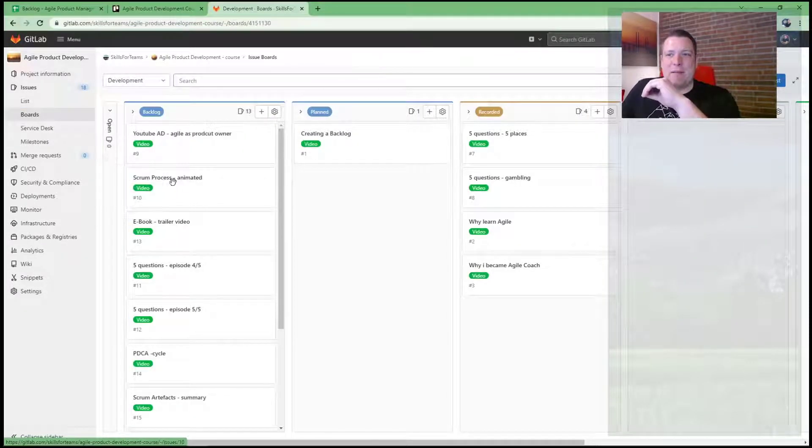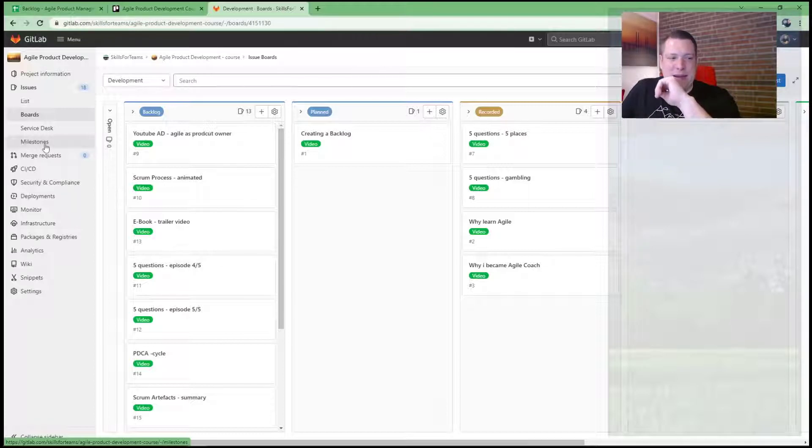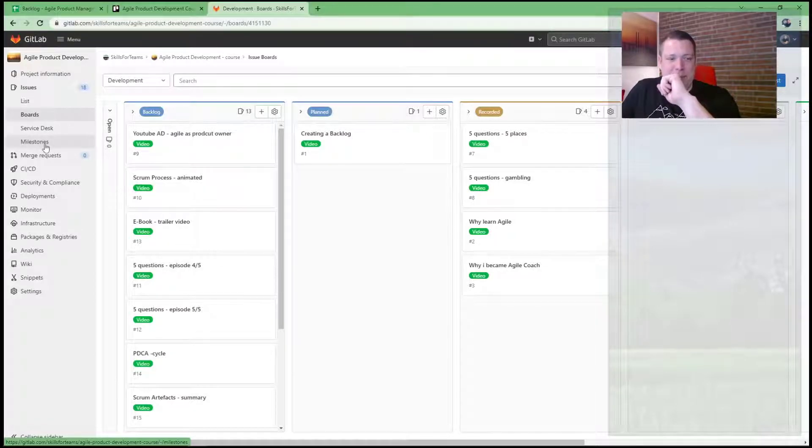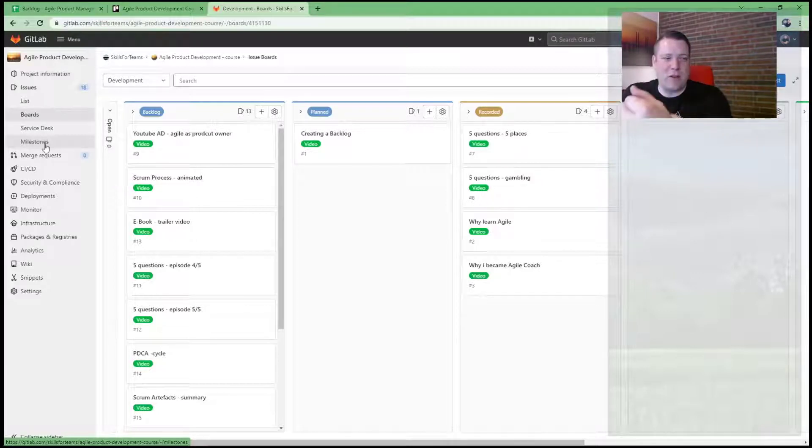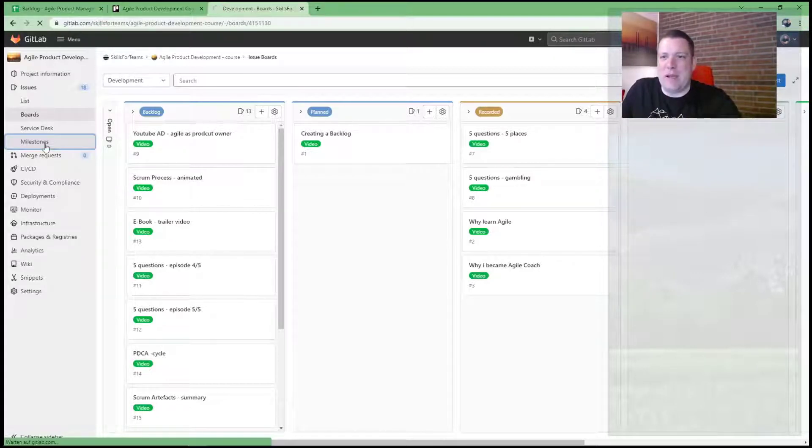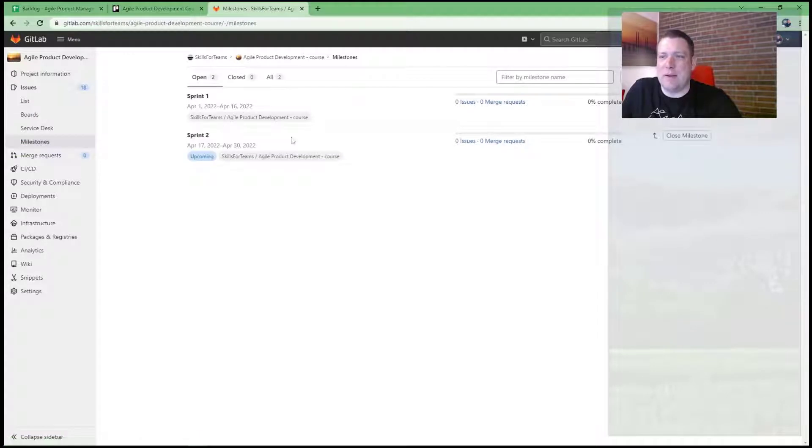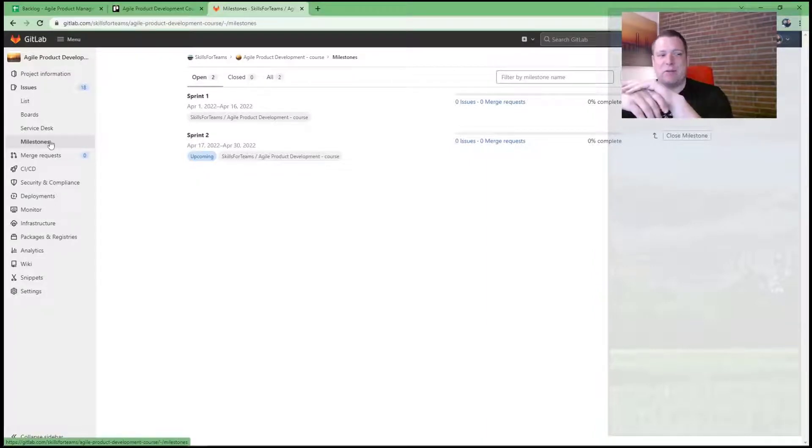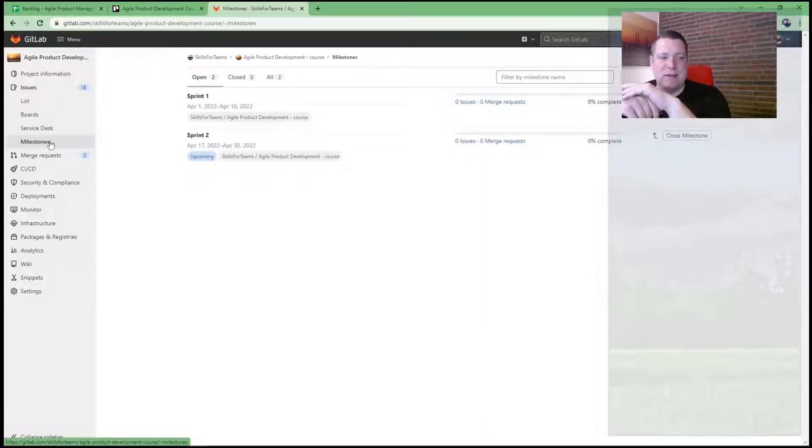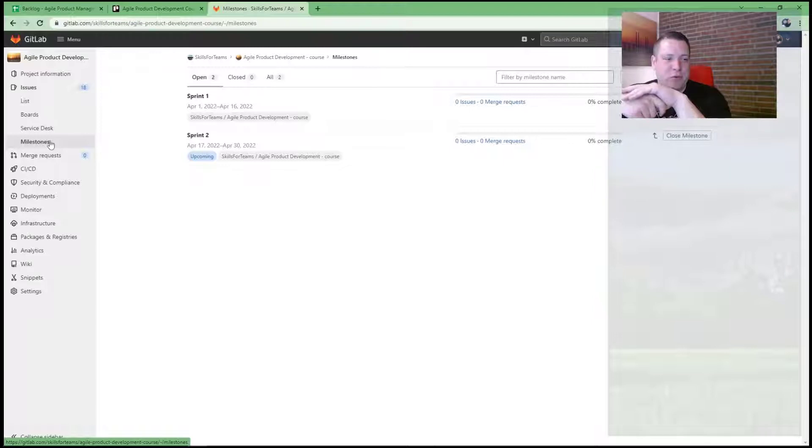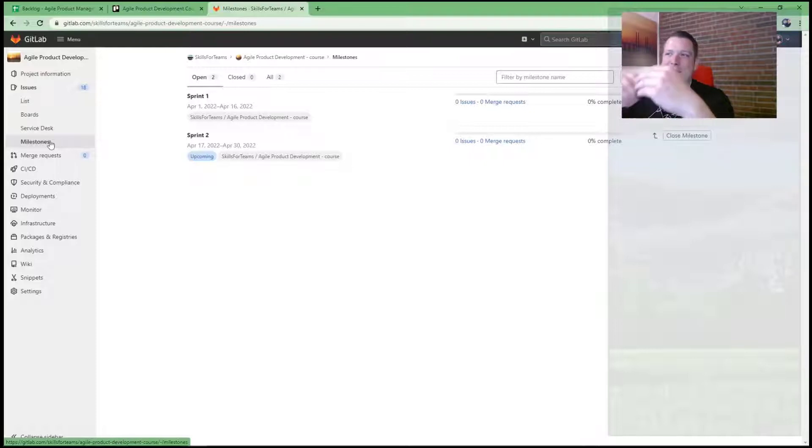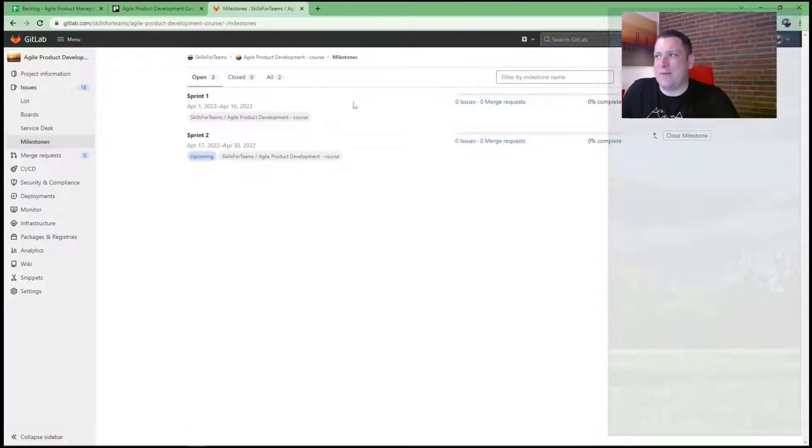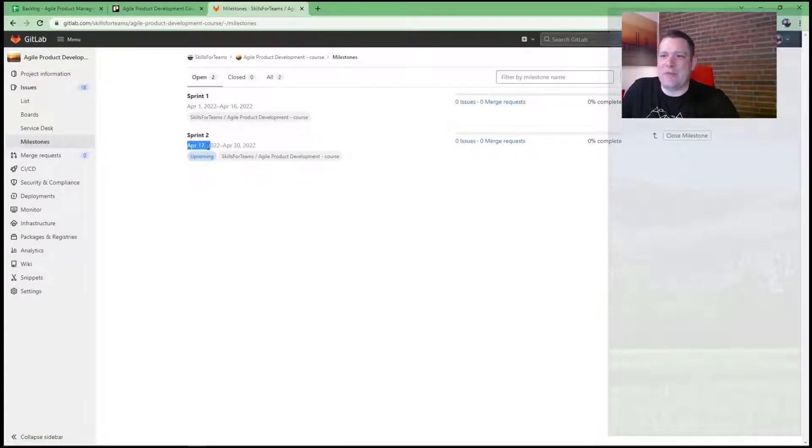So that is a bit view how to realize it. There is a possibility to realize sprints in GitLab. In Scrum sprints, you know, only one sprint is running at the time and you should be able to list the ticket to a sprint. And for this one, you can use milestones. Actually the milestones are not built in for Scrum. It's a different concept from traditional project management, but you can use it as a sprint.